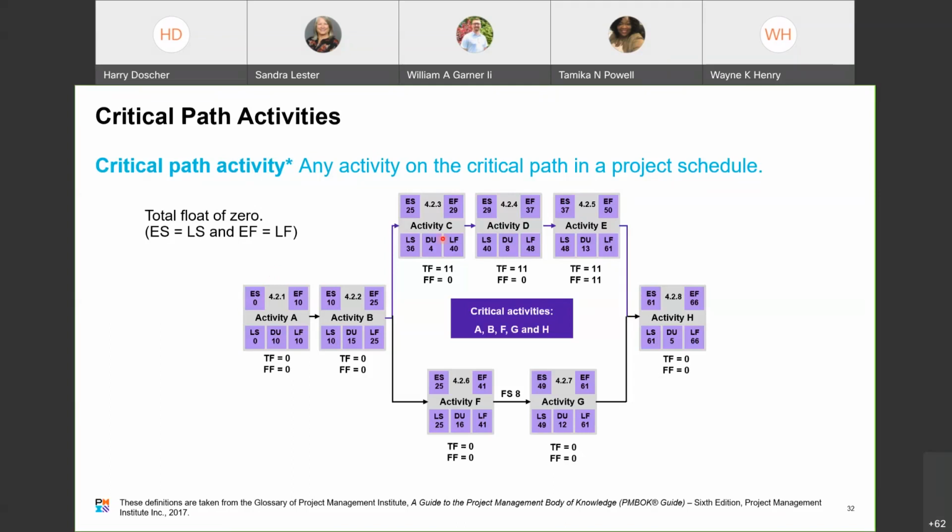If you had a delay up here that accounted for, say, 2 weeks, okay, that would become the critical path through here because you could finish these activities before you could finish these. Mm-hmm. So yeah, definitely you don't just calculate it once. You have to go back through and assess your network diagram, make sure it's still accurate, and then plug in your dates and your durations, taking account of any changes that had occurred since the last time you did it. So yeah, definitely it can change.